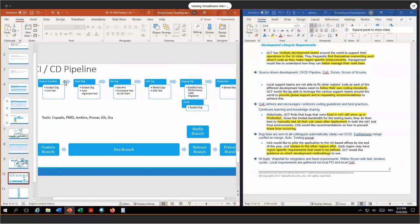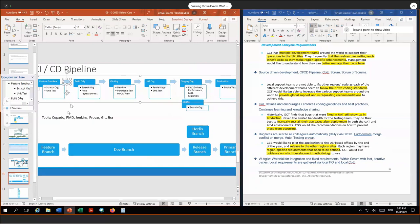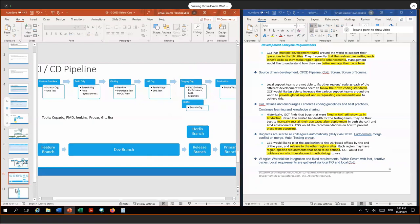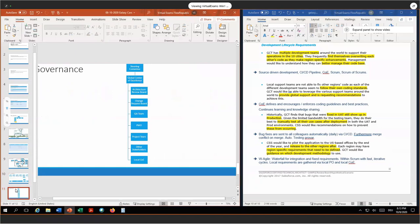Please note these are not change sets — all code is always deployed from our source code. This brings me to the last requirement: our governance model. On top we have the steering committee, which makes sure the project is always aligned with business goals. Below that we have a global Center of Excellence, which contains the architecture review board — which defines and ensures the architecture is appropriately built — the change request board, which takes care of changes that come up throughout the project, the QA team, PMO, project team, and other stakeholders like the accounting team or inventory IT team, as well as the local COEs. The global Center of Excellence defines and encourages coding standards, takes care of conflicts between teams, ensures knowledge is always shared, and ensures different project parts are properly aligned.